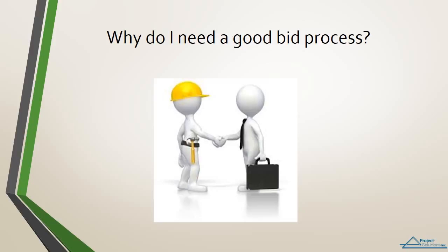Why do construction firms fail so often? There are many reasons, but most of the time it is due to poor estimates. The lifeblood of construction firms is profits based off bids or negotiations. The quality of a bid is dependent on the quality of the estimate behind the bid. Estimates that are too high leave a company uncompetitive in a bid, and estimates that are too low leave a company unable to make a profit.